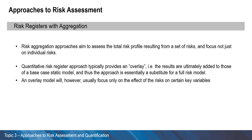Note that the quantitative risk register approach typically provides an overlay, meaning the results are ultimately added to those of a base case static model. Therefore, the approach is essentially a substitute for a full integrated risk model. However, an overlay model will usually focus only on the effect of the risks on certain key variables, most often just one, such as cost or revenue.